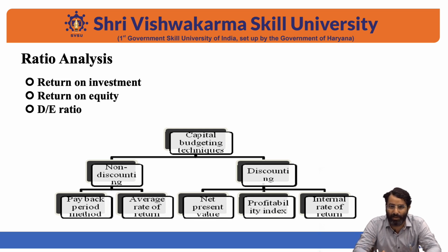If an investor is going to make an investment in a project, after what time is the investor going to get back their money? One of the simple ways is the payback period. So an amount X is divided by the number of years, that is, we calculate based on the inflows which we are generating in different years.